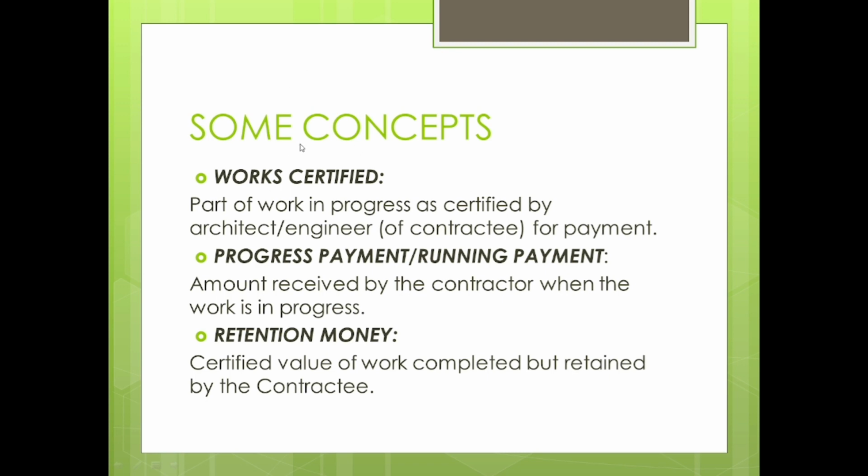Out of this 100, the contractor feels that 20 needs to be retained. So he retains 20. That means the balance, that is 80, is paid. So this is called running payment. I hope things are clear now.